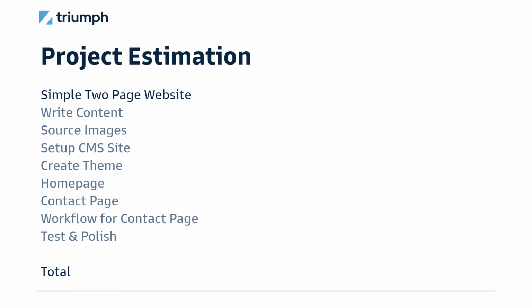So the old way of doing it, if you're lucky, is called a work breakdown structure. I've broken my work down into little nuggets, and now I'm going to estimate each one of those nuggets. If you're just ready, aim, fire, maybe you made this work breakdown and this little list, and that might have been good enough for you. A lot of people probably wouldn't even do that. They'd probably just say 2-page website, I don't know, let's say 5 days. But you were a little bit more structured. You made your work breakdown structure and a little estimate. Okay, so that's a great 1-point estimate.